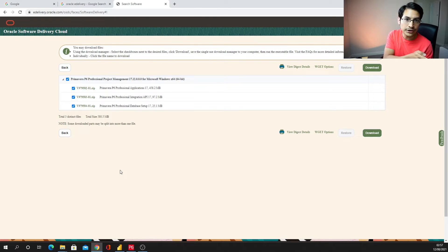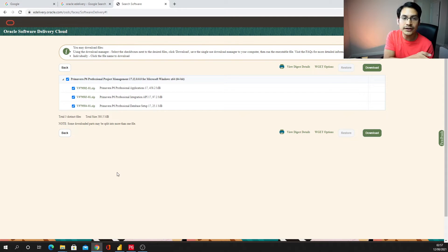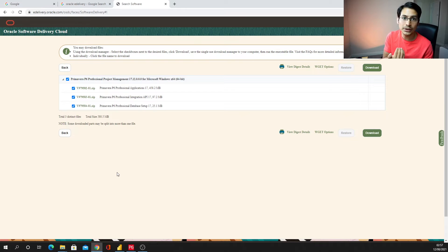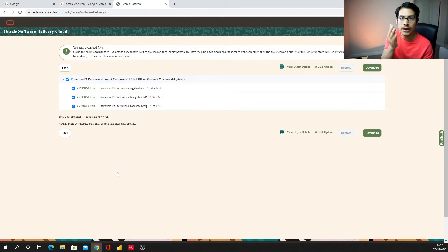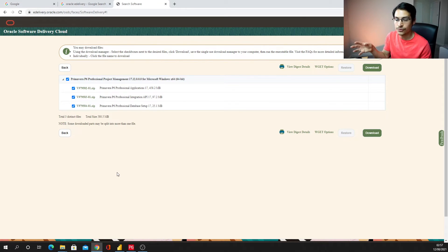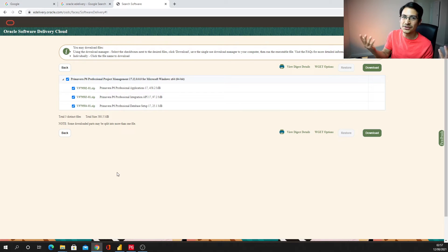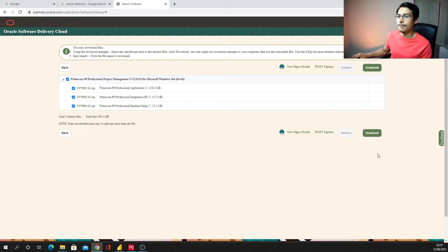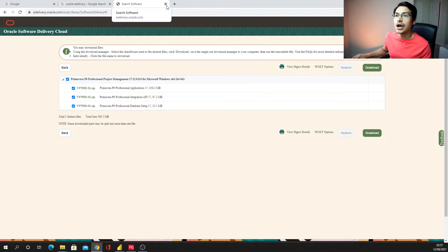Once you find that installer, the setup it's just going to go kind of straightforward. Agree, agree, agree, agree, and you can select which type of database you want to install. So by default is Oracle, but you can choose between SQL, SQL server, and also the new addition is SQLite that is the easiest one to install. So I would recommend you guys to install SQLite.